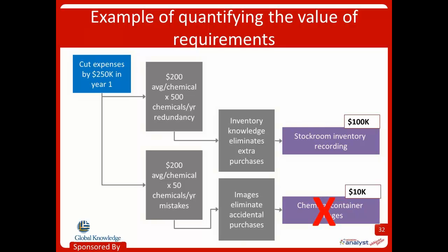And the reality is actually that we don't use them anyway. So there's an interesting statistic that 65% of features are rarely or never used. So wouldn't it be great if we could cut them before we ever wasted all that time building them, right? So it helps us have a chance at actually being successful in our projects, bringing them in on time, if we can just cut the unnecessary stuff that we really, really don't need.